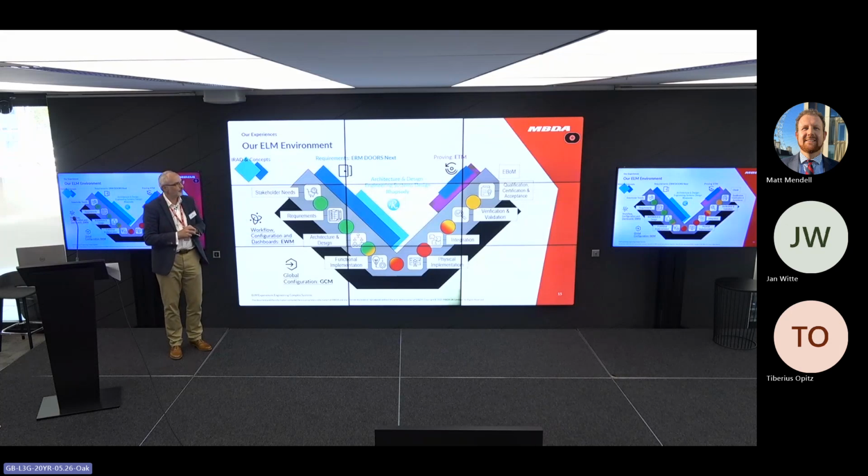They're really neat because somebody can come along, create a new capability in EWM. A recent one is assumptions. If you've got a big team, lots of people doing stuff, and there are no requirements, or the requirements aren't signed off, or the requirements aren't mature enough, they tend to make a local assumption, I call it. Might be in Doors, it might be in Rhapsody. Over a period of time, that explodes, and it's a risk. So by formalizing those local sets of technical assumptions, all over the place, into something like EWM or Doors Next, it becomes centralized. It becomes that single source of truth that people work to.